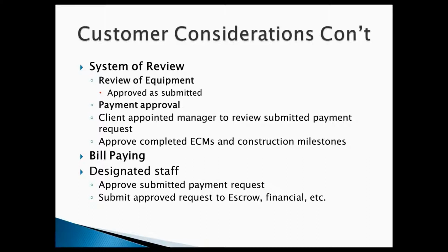When you get a payment request for a completed ECM, your staff, your panel should know whether that ECM is done or not. Please make sure that you check. Do not submit for payment a request of an ECM that is not completed yet. So you really want to make sure that the customer has a manager who is going to approve these requests. And then you're going to have to pay the bills.